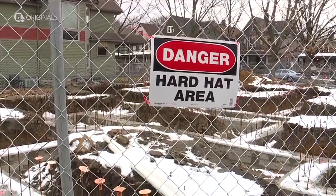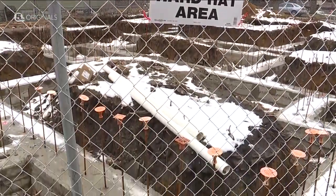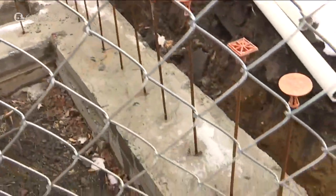As for the construction delay, Ted says it has to do with the kind of eco-friendly building this group does, which involves testing the concrete after it's been poured. So that it's able to not break and bend and fall apart in the weather conditions that we have here that are very harsh. So Ted says construction will start up in the next few weeks as those test results come back in and weather permitting, because the concrete can only cure in certain temperatures.